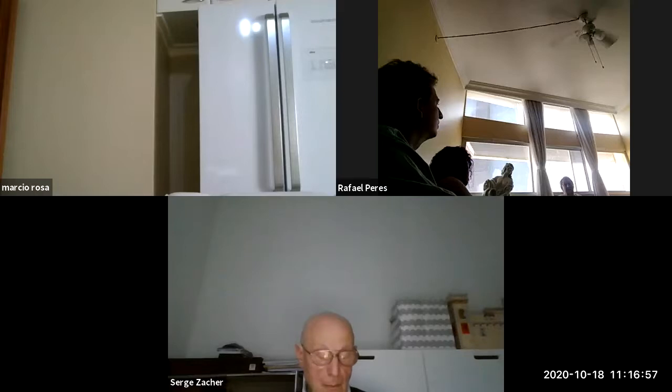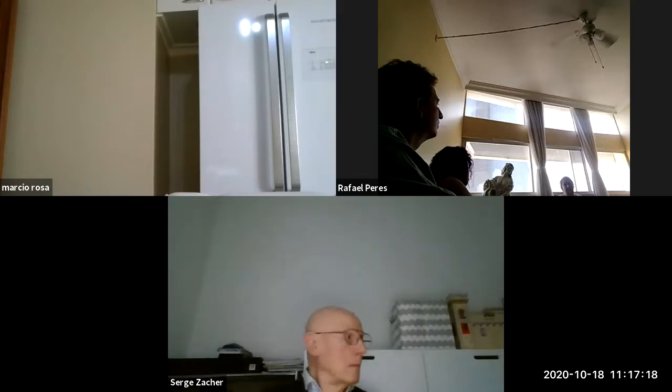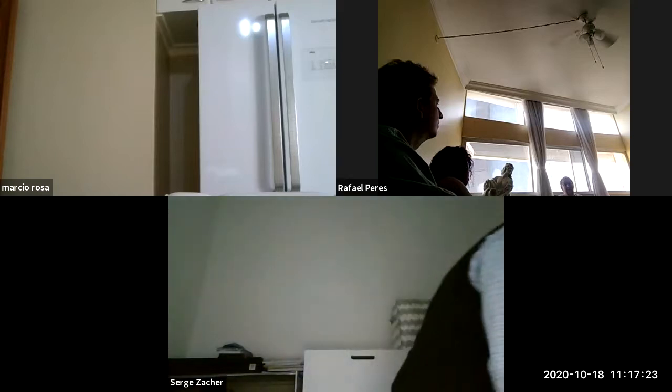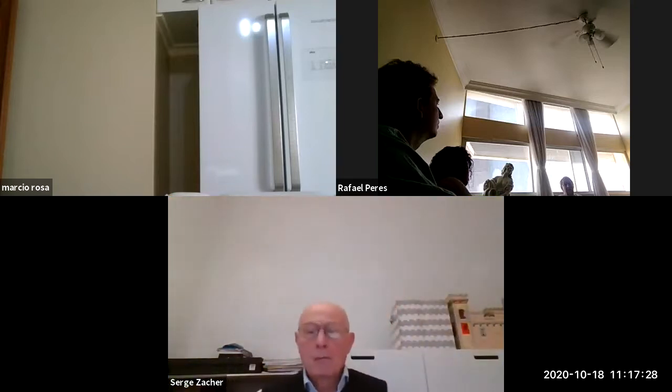And we do the backward calculation from that point and identify three types of activities: project critical activity, which is shown in orange color, then level critical activity, which we show here in blue color, and non-critical activity, shown in green color. So to further explain this approach, we did a sample project. We chose some random activities and built the interdependency between these and did the calculation for that.